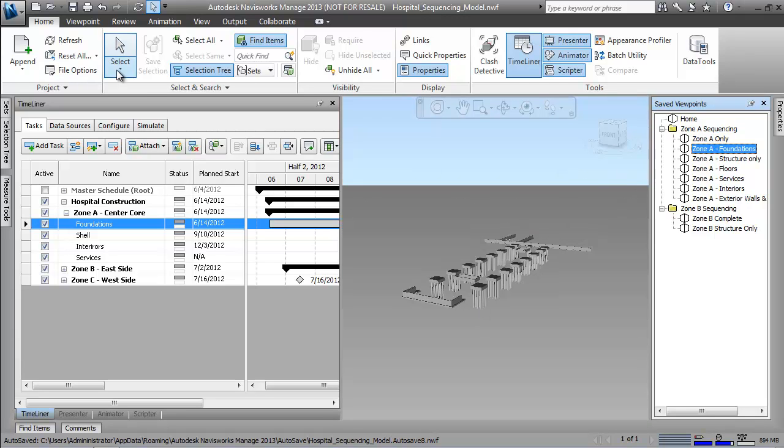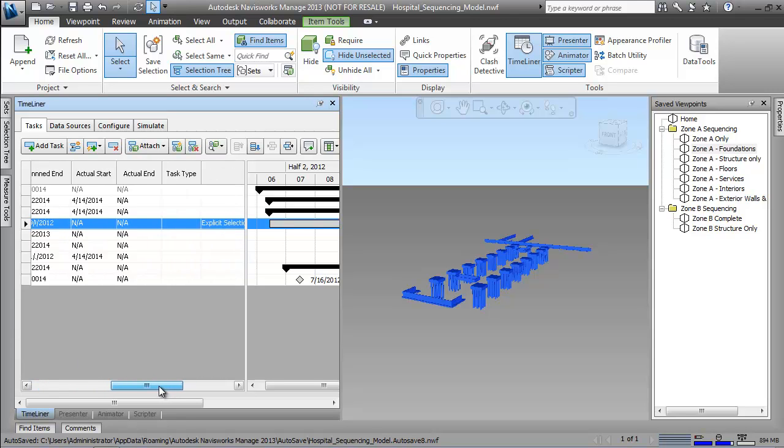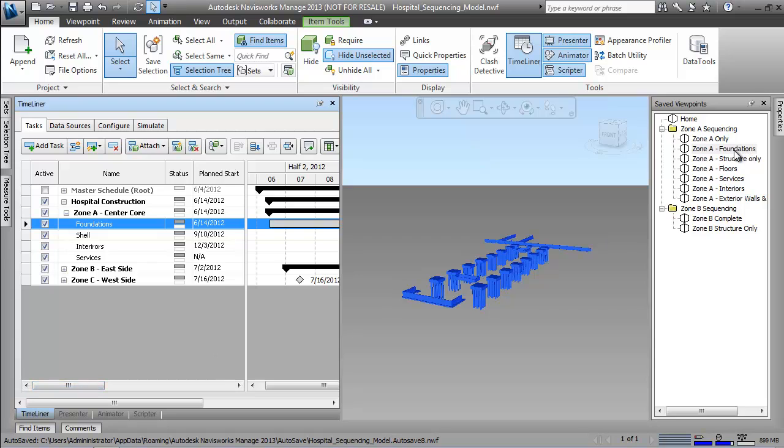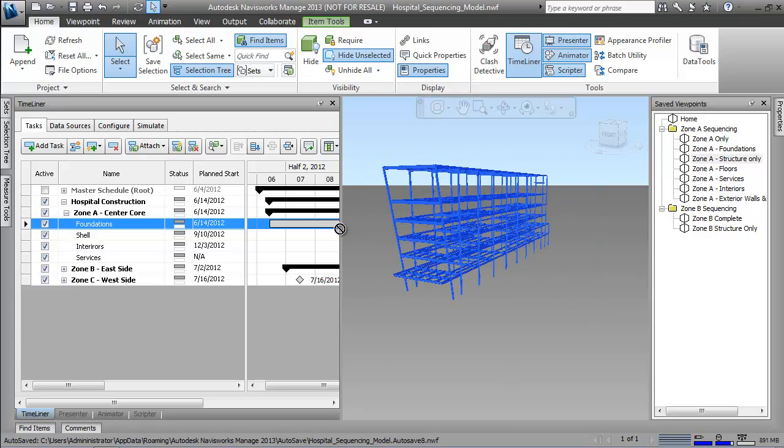The Autodesk Construction Solution supports workflows for creating project activities based on your categorization of the design data, which can be used to ensure the correct order of events, producing a skeleton schedule. With common tools such as indenting, moving, and grouping tasks right at your fingertips, creating a schedule here in the model environment saves time and streamlines the workflow.